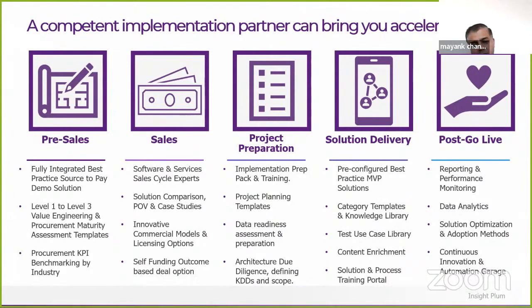So let's say you selected the solution and the implementation partner, what kind of training you have in place on the preparation pack to get the project team mobilized and to effectively do the project planning and make the rest of the organization available for the project. Again, talking of the best fit factors, the get fit factors, the data readiness assessment and preparation is an important aspect. Architecture due diligence, as I pointed out earlier, all these are important aspects of your project preparation. So I highly recommend using this waterfall approach for project preparation.